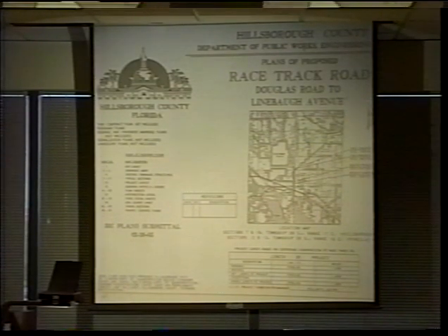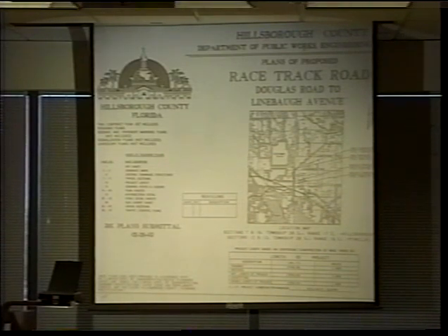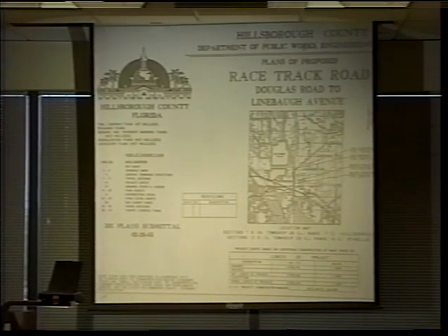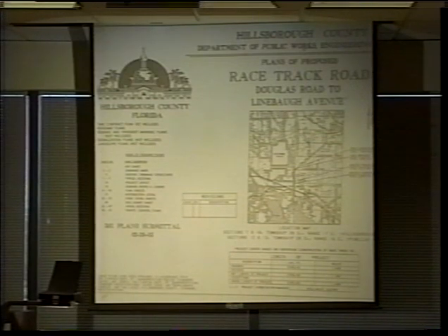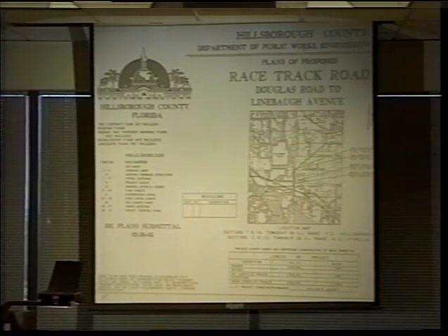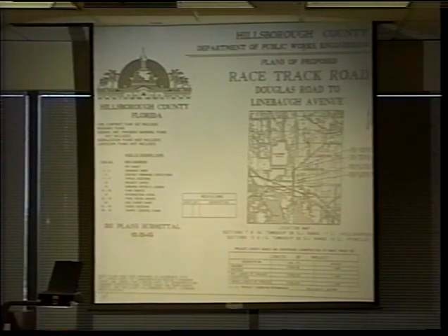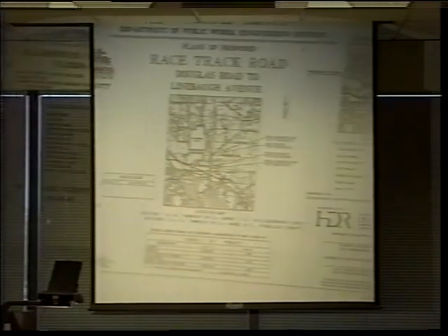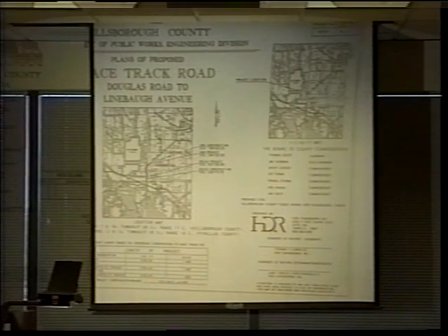If you're dealing with this particular project, you'll recognize that drainage is not going to be complete, and there are many elements of the design that are still incomplete. So oftentimes, hard conclusions and assessments of impacts are made on less than complete plans, so you'll want to just reconcile that. That's the kind of information you'll typically see on the title sheet. Right-hand side, the particular firm that generated this drawing and the names of some key individuals.